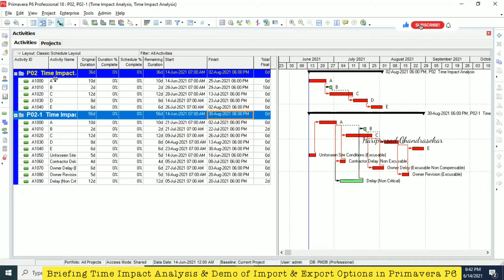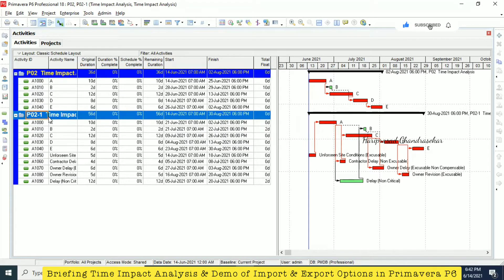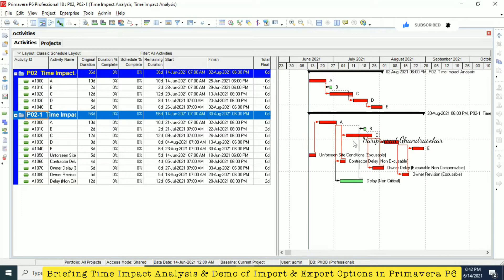This is the original project. I just copied that and then I'm putting the delays. As per the delay, we can see the critical path changes, and then the float also changing.